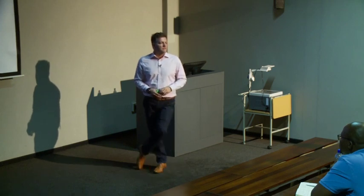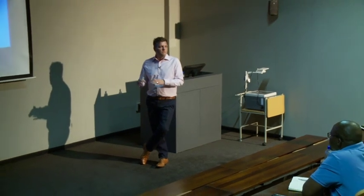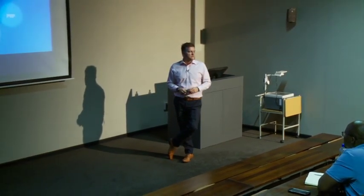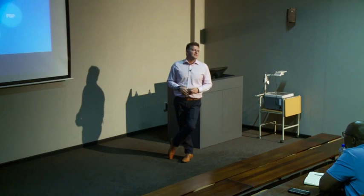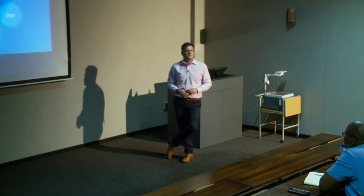You have to have that roughly correct. What do they call it in project management? The rough order of magnitude. You have to have it close to 80% right. Although the PMBOK describes it as between minus 70% and plus 20%, which is hectic.